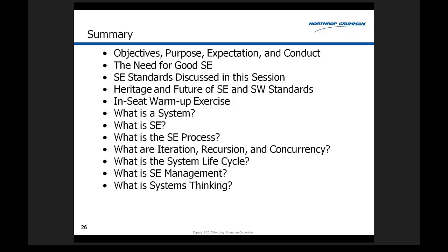So it's a very effective way to measure requirements satisfied, and the earlier the better. The earlier and the lower the level of the requirements hierarchy that you can satisfy and prove that you satisfy and verify them, the better. Don't let them go to the last minute. Okay, hopefully I've answered the question.